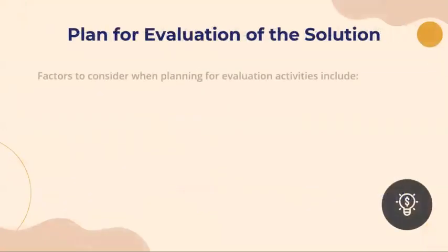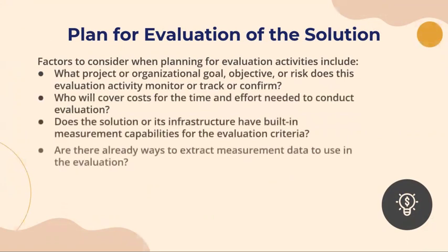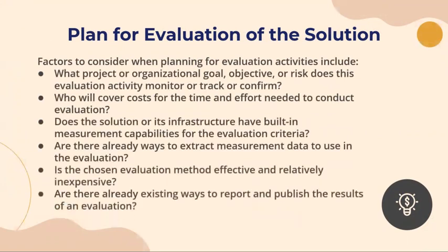The next one is plan for evaluation of the solution. Undertaking evaluation activities is not a trivial task. It takes time and effort to identify and confirm evaluation criteria. Implement anything necessary for taking measurements that is not already built into the solution or its infrastructure. Take the measurements and report on and analyze the measurements.